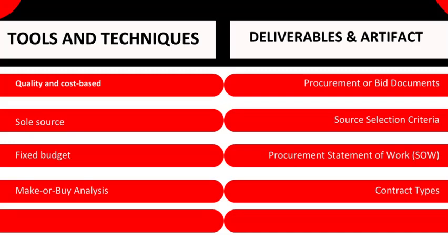Procurement statement of work, SOW. The SOW describes the procurement item in sufficient detail to allow prospective sellers to determine eligibility. It is developed from the project scope baseline, defining only the relevant work.